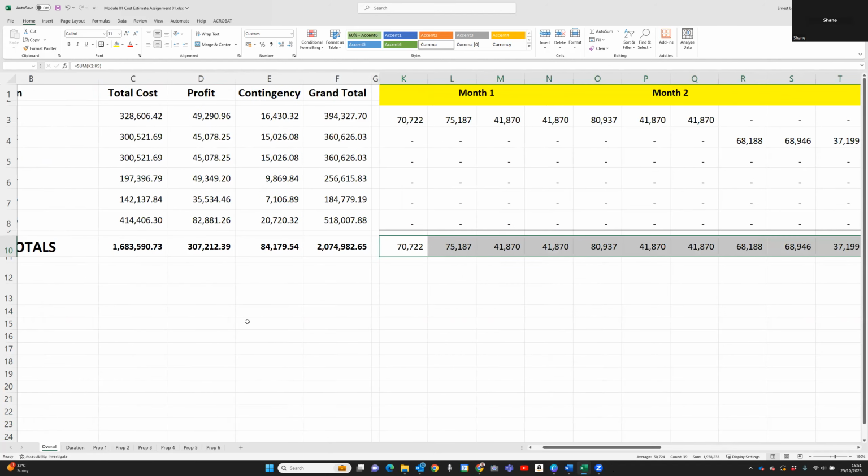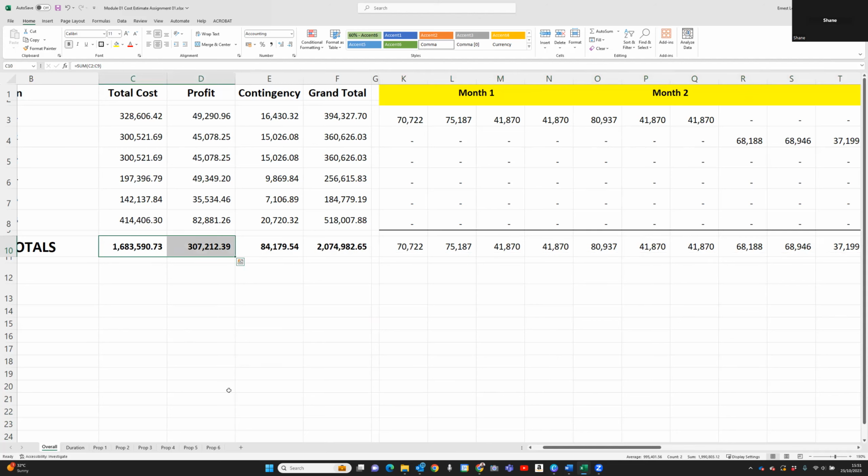Yeah, I think there's something wrong there. Yeah, sorry, these two. It doesn't allow contingency in it. Because your contingency, you should not include in your budget. Your contingency is there for unforeseen issues. So like, say, oh shit, I forgot to get a permit for XYZ or whatever the case might be. Then you have to use that money. That 84,000 bucks is then for contingency.